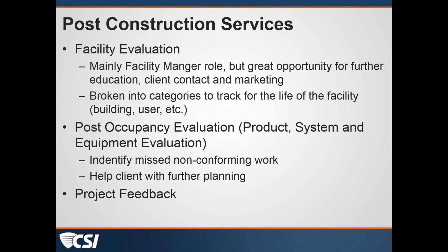Just a couple of things. The one-year warranty is an opportunity to sit down with your client and take advantage of some of these items that Jim just talked about. One tip, so to speak, for helping to get documents in at the end of the job. Everybody knows about liquidated damages and holding money for getting those closeout documents done. And typically, substantial completion is a time when that retainage can be reduced further, or those payments can be released.